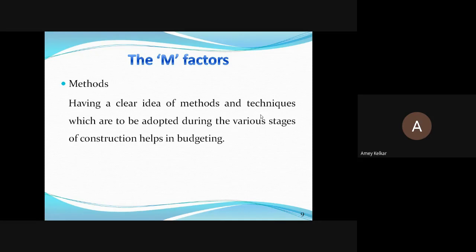And the soil condition. If you have boulders or rocks, for example, in Belgaum area, if you go to Udyambag side, it's completely rocky strata, and it's nearly impossible for manual laborers to break those stones without a jackhammer. At that time you cannot be stubborn saying that it should be done manually only. You have to go ahead with the right method. So what method you will adopt for a particular site has to be clear.